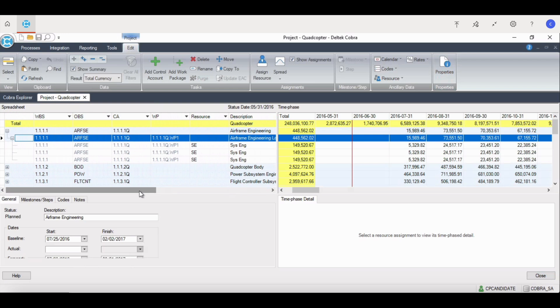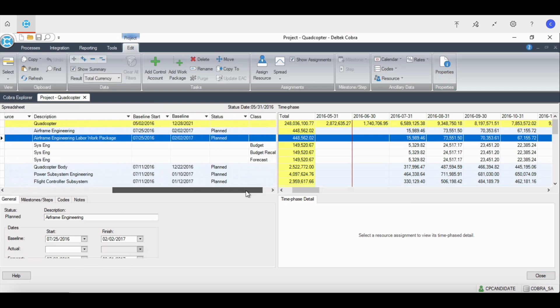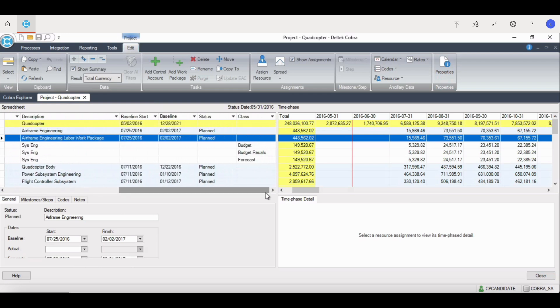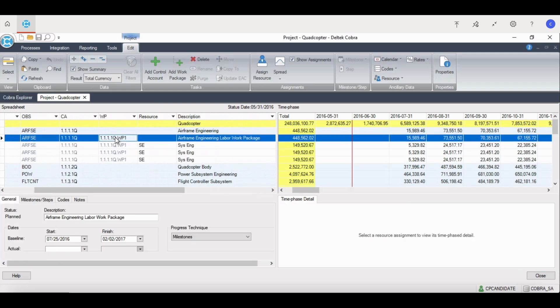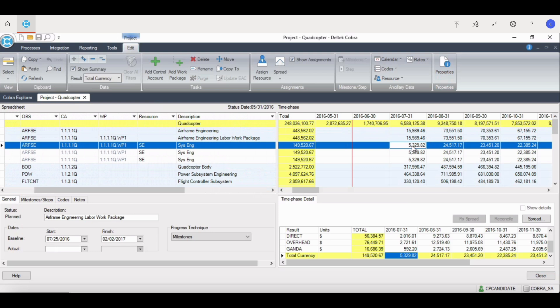If we scroll over, we can see the different classes for each of those resources. Here we have actual, budget, earned, and forecast. The second quadrant in the top right, or the time phase resource detail summary, shows your resource broken out into time phase months, or periods, depending on how your calendar is set up.